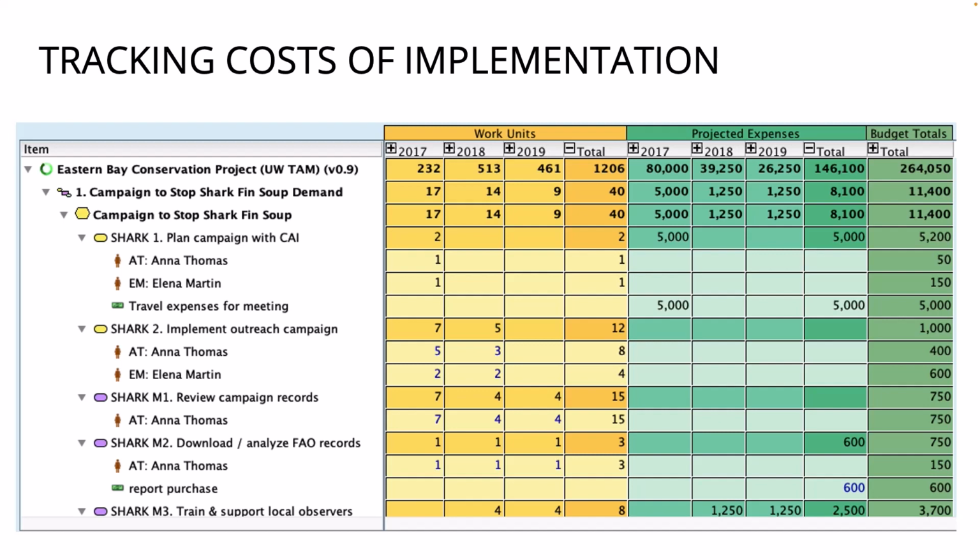And these accounting codes can be incorporated into the timesheets that all your program team members fill out, as well as budget reports for program expenditures. Collecting and analyzing how much time and treasure you spend on each action will allow you to better track and adjust your resource assignments, create more accurate forward-looking budget estimates, and ultimately assess the cost effectiveness of different actions.